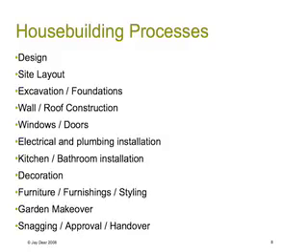So, next stage is thinking about processes. What are the different processes for building a house, let's say? Here's some examples. Different sorts of skills needed to do these. To build a wall or build a roof versus put your plumbing in. Different skills. There's some implied sequence. You need to do some things first, some things afterwards. You need to build the walls first before you put the roof on, for example.